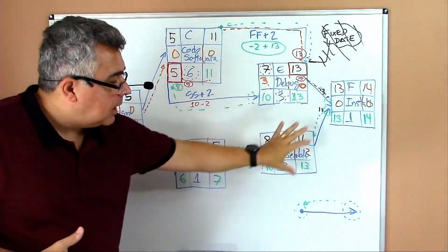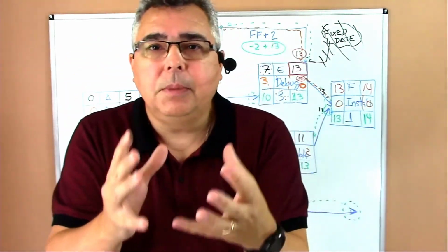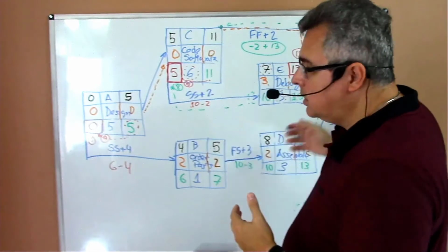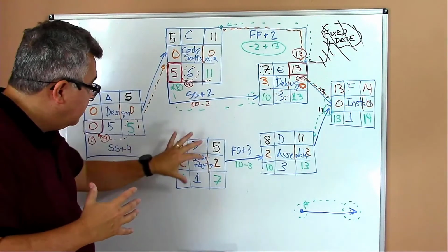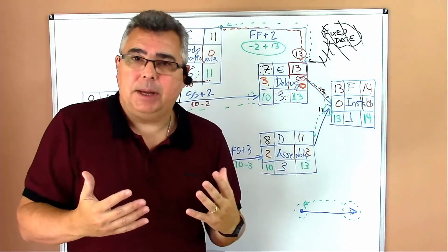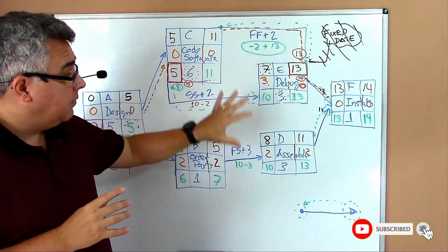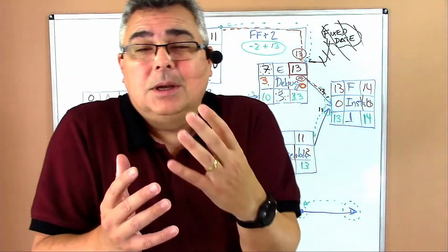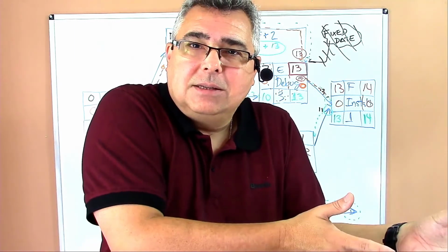Okay? And then we have the network. So it's important to understand here, the project manager could choose to use finish to start in all the activities. He could choose that. But he decided that in some tasks, he could overlap a little bit and try to anticipate to mitigate the project risks. I don't say if he gained time with that change, but he's for sure mitigating project risk, because if a task can start earlier, you reduce the chance of delaying that task. Okay?